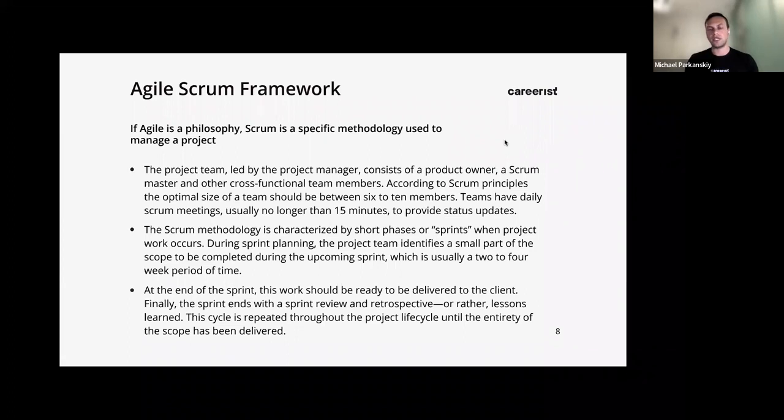This is what we want to accomplish. And you figure out within this team what your delivery is going to accomplish in the next 2 weeks. So let's say you want to fix these 2 bugs. You want to put, let's say, a button on this page, and you want to create this particular page that has this information. And how long is this going to take? This is going to take 2 weeks. Plus, you'll be able to maybe QA this in the 2 weeks. And this is your sprint.